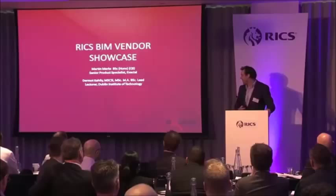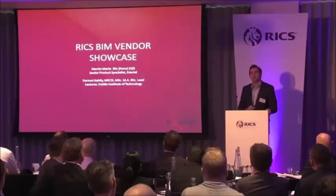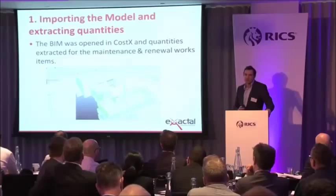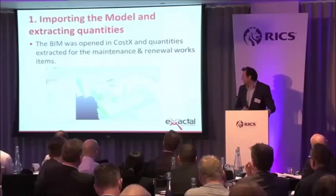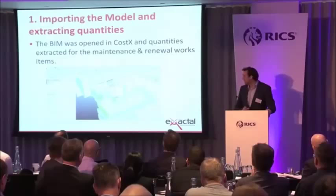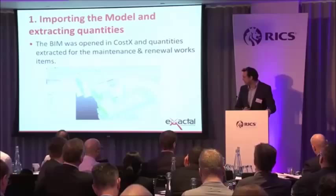So I thought I had a bit more time — I've got 20-odd slides, so I'm just going to skip by the first number of slides. Trevor has already really addressed them in terms of how you bring in a BIM model into the system and how you extract quantities from that BIM model. So we brought in the IFC file and extracted quantities from it, but just like capital cost, you cannot get everything from that file. It's quite useful for some areas, particularly for counts, but we found we needed to supplement that information.